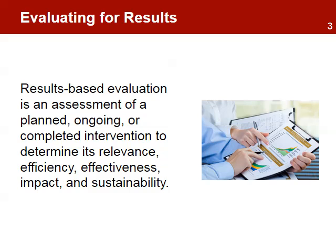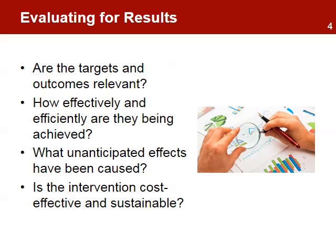Evaluation seeks to know if the progress toward the impact is caused by the project or if there is some other explanation for the changes identified during the monitoring phase. The goal of evaluation is to find evidence of what results are or are not being achieved. It seeks to address issues of causality — that is, to determine if the results change logic is sound or if it needs changes.